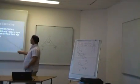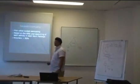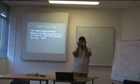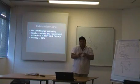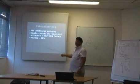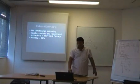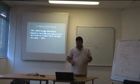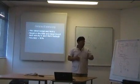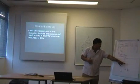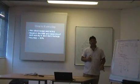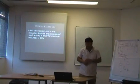And look at the accuracy. The accuracy is plus minus 90%. So you're becoming more clear, you're getting more closer to your goal. And there's a plus minus 10% variance there. So the detail estimate comes straight from your WBS because in your work package, each and every activity or task has been allocated for cost in terms of manpower, material, and labor.